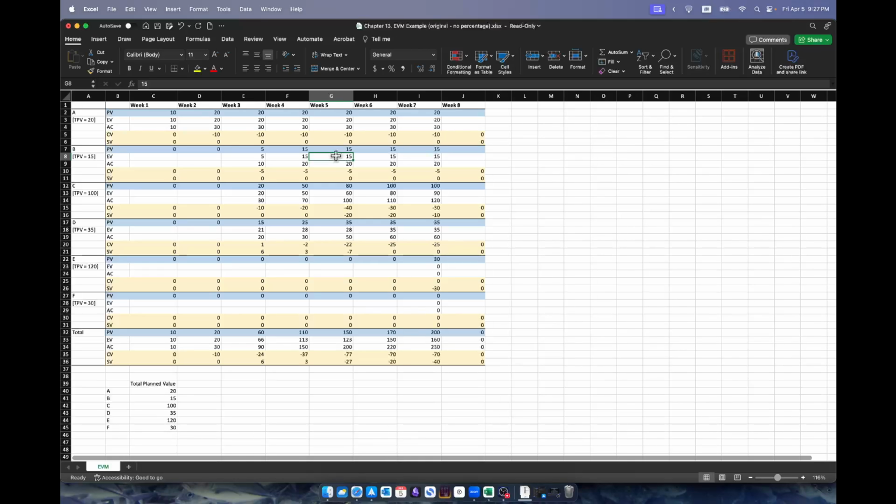The percentage can be the number of tasks completed out of total tasks that you have initially planned for, or you can roughly say 25, 50, 75. You increment by 25%, and it's really flexible. But the key is you would use percentage to express the progress. Only when you express the progress using percentage can you calculate planned value and earned value.